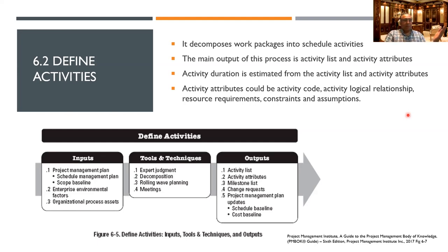If your friend in India asks you, I'm applying, I have to do the IELTS test, how do I do it? You will tell them these things. You have to enroll online, go to a tuition center, study on your own, get the book from a friend, and book the test. So all those things are the activities. The schedule activities are more detailed than the work package. One is that you will define what they are. And second, you have to tell what is the logical relationship.